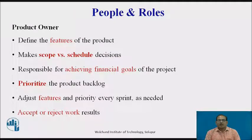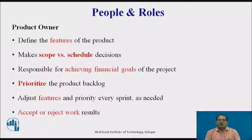There are three types of roles internal to the Scrum team and one that is external. The first internal role is the product owner. The product owner is the primary interface between the team and the business owner and is responsible for maintaining and prioritizing the backlog of tasks to be performed. This is performed transparently and collaboratively with the development team. The product owner is also the arbiter of questions concerning backlog items and ensures the team understands the purpose and value of the application. The product owner also keeps the backlog current as new and existing requirements are refined.